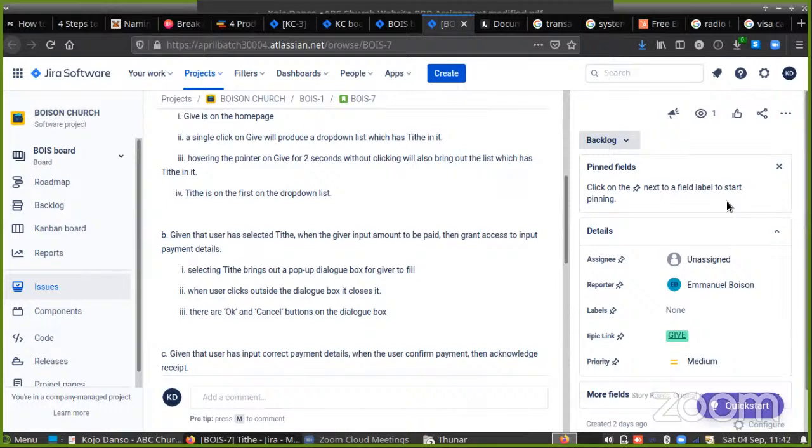I was just saying that you simply have to go with what the stakeholder shared with you. If there are going to be several alternatives and several scenarios, the stakeholder will discuss that with you, right? That in the course of payment, in the course of transaction, in the course of this process in our system, these are the likely events that could show up. Scenario 1, scenario 2. If this happens, this is going to be the alternative. This is going to be that. But if in the elicitation process we were silent with that, then you cannot just write anything here like that.